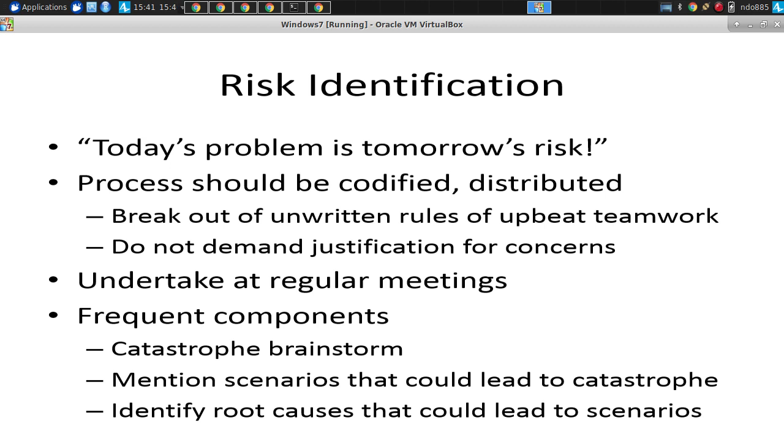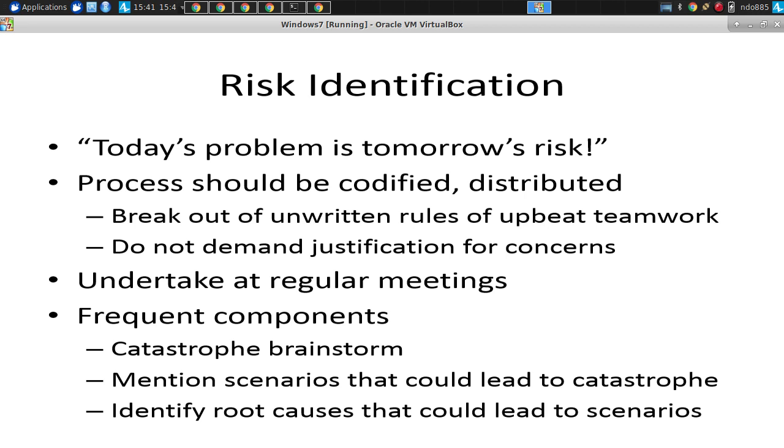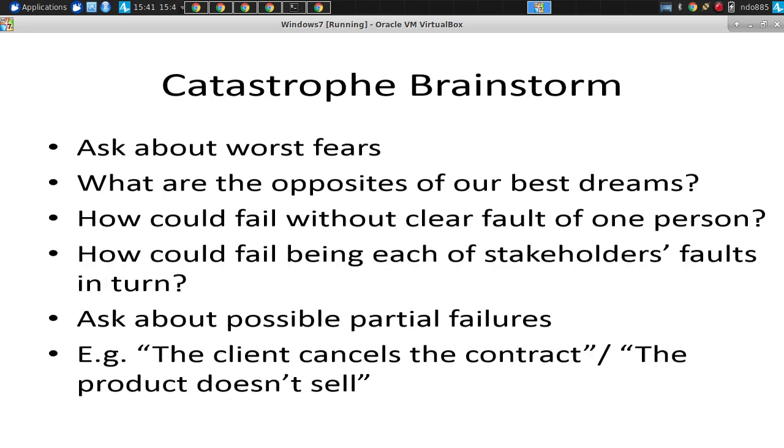Talk amongst each other. The person who takes ownership of risk management, who's the main person who's going to be doing risk management? Austin. So you should go around and talk with each person and find out what their fears are, what things they think could really go wrong. Are there issues where they think the project could go off base? Maybe it's communication issues. Maybe it's issues with interaction with the stakeholder. Maybe it's concerns about the technology. And often people will have somewhat different perceptions of risk. So Mo is going to have a lot more contact probably with the details of the development system than, for example, Jay or Jesse. So you should go around and talk to people and ask what possible things could go wrong.